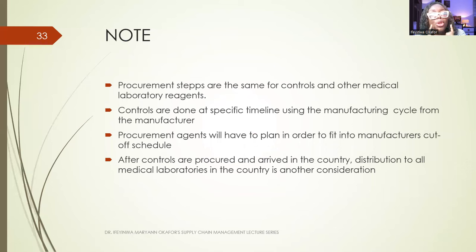Yes, but you should know that procurement steps are the same for controls and other medical laboratory reagents. It's the same steps you go through for procuring controls and other medical reagents, but controls are done at a specific timeline using the manufacturing cycle from the manufacturer, and procurement agents will have to plan in order to fit into the manufacturer's cut-off schedule for controls. And after controls are procured and arrive in the country, distribution to all medical laboratories in the country is another consideration.